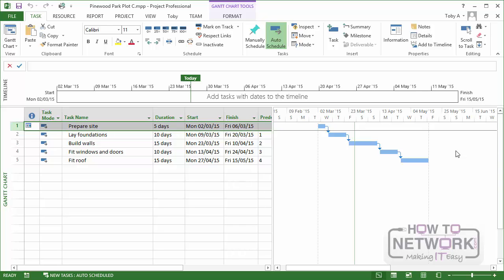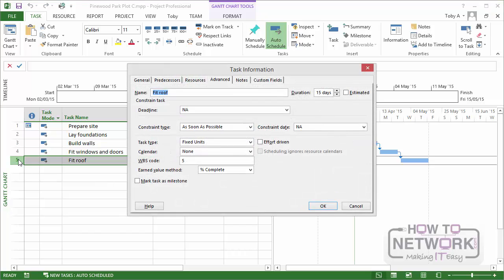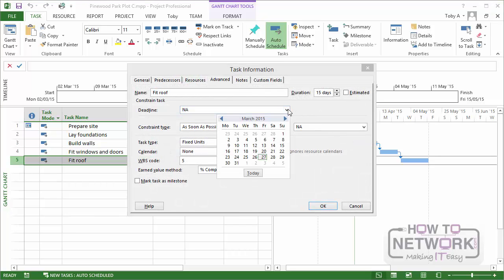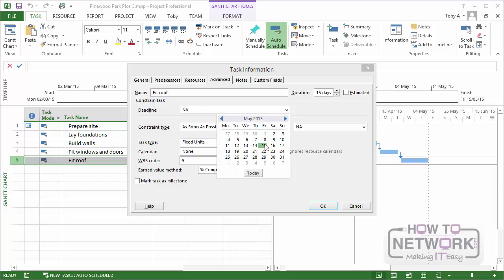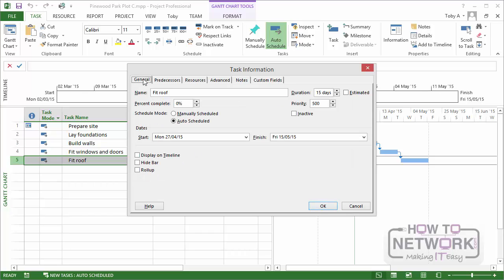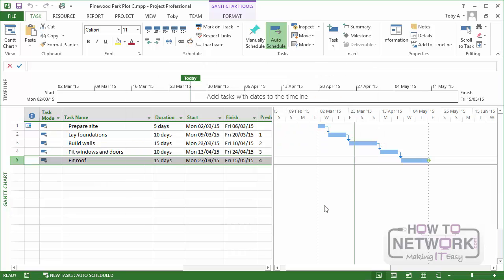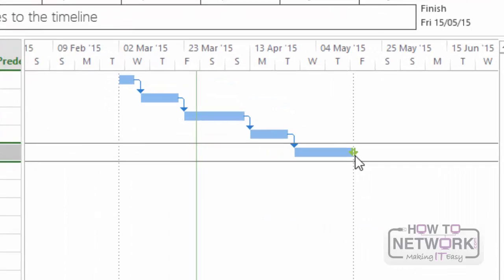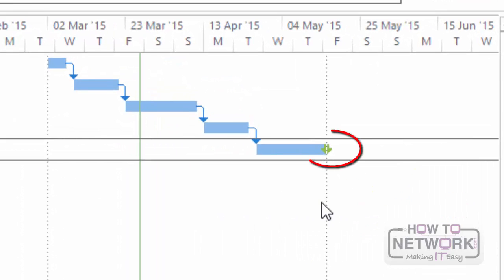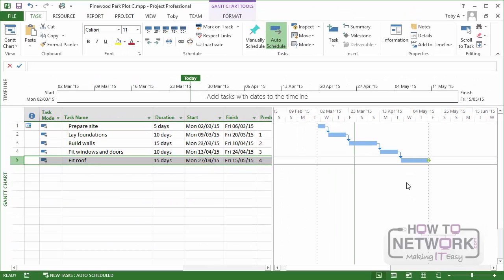Let's suppose that our target for this project is to fit the roof by May the 15th. So if I double click on Fit Roof, I go to the advanced page and I set a deadline of May 15th. Note that is the current scheduled end date. If I click on General there, you can see that the finish date is May 15th. Click on OK. What happens, you might just be able to see it, is a little arrow on the row corresponding to Fit Roof. A little deadline arrow is visible.